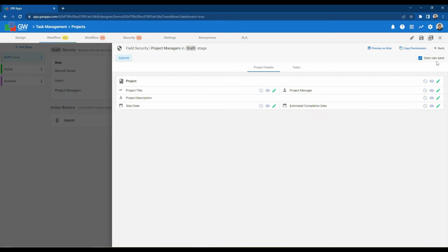This could be useful if a project is upcoming but not yet active, and we could even create a scheduled trigger similar to our overdue task trigger to automatically check the start date of draft records and change them to active when the start date comes.